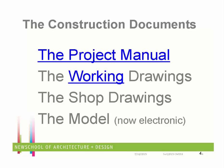It was a 17-story high-rise. They were doing a floor that was 90 feet by 270 feet long, so they were doing half of the floor. And what they were trying to do was what we call a 3-day pour schedule. That meant that if I poured this deck 3 days from now, I'd pour the deck on top of it, okay? The problem is with the 3-day pour, all the math says you have to have 3 sets of forms, because you have to support the concrete.